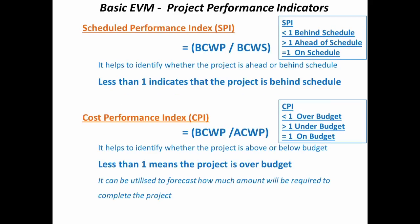Another way to look at performance is SPI — schedule performance index — and CPI — cost performance index. These are ratios. For the earthwork example we got values of 0.4. If SPI is less than 1 it is behind schedule, greater than 1 ahead of schedule, and equal to 1 on schedule. Management will ask for SPI and CPI to judge where the project is at the monitoring phase. CPI has a similar ratio and similar range.